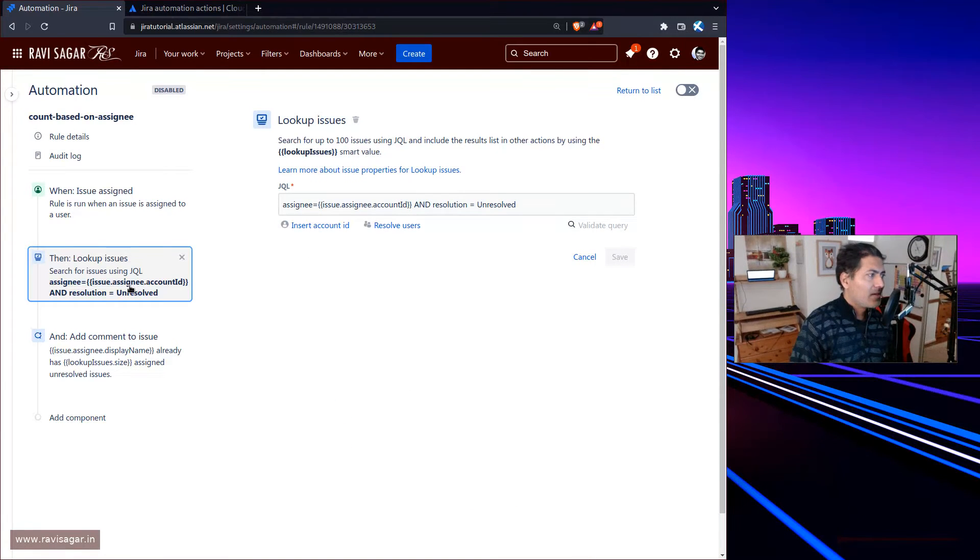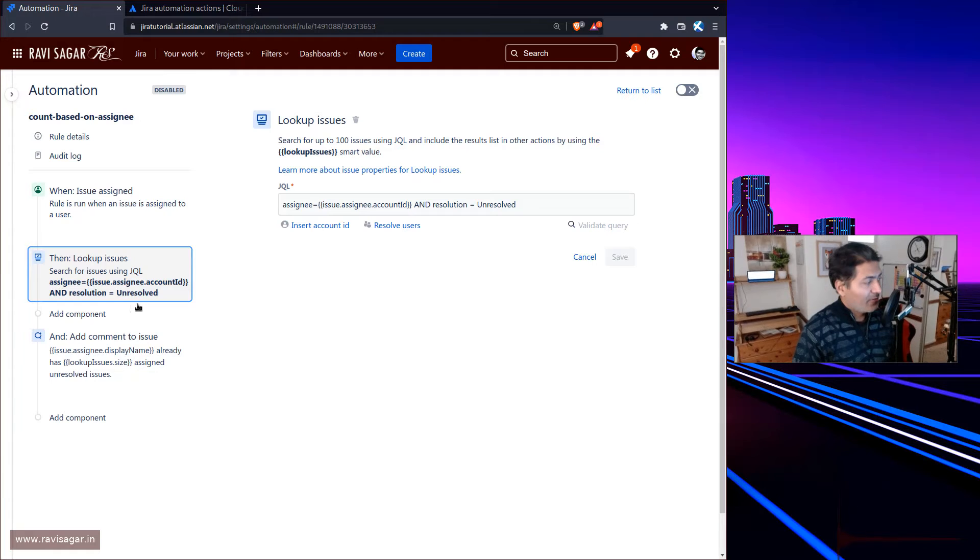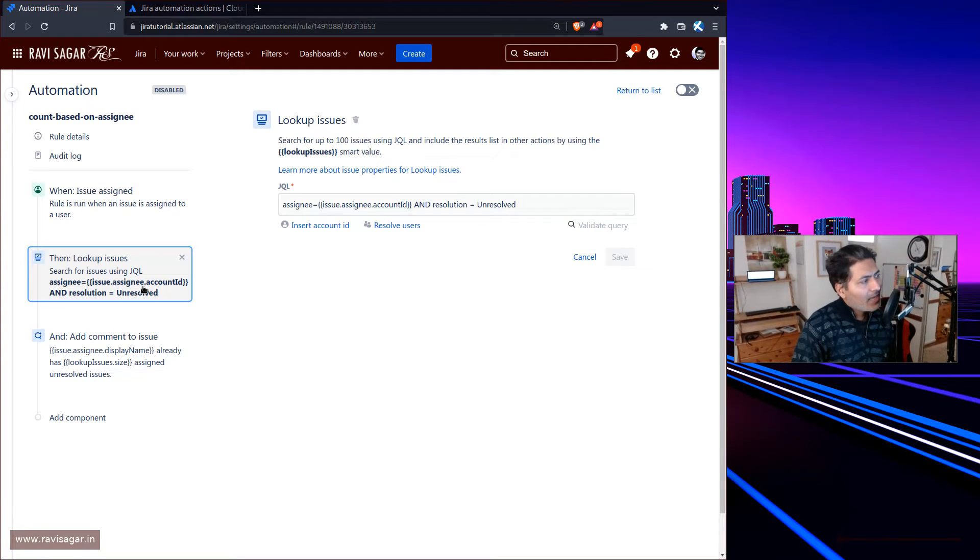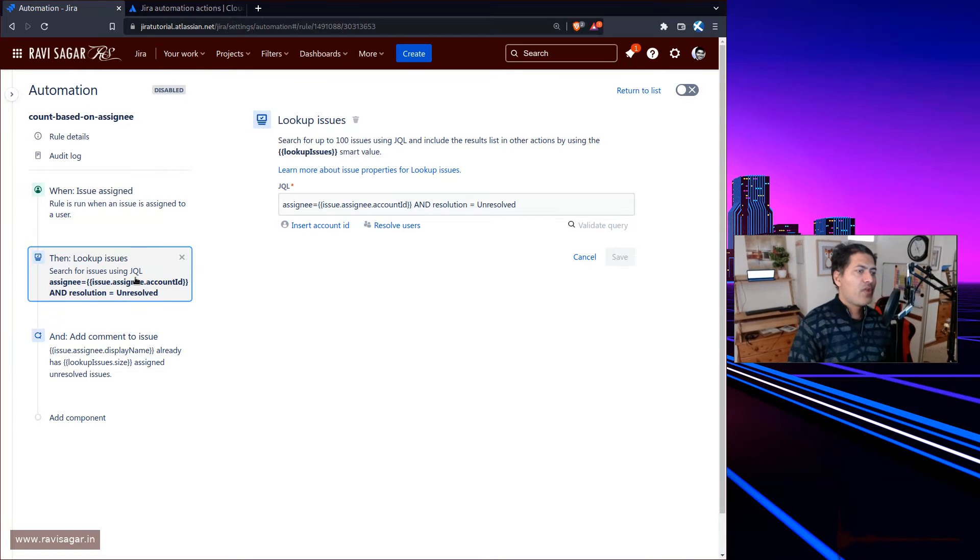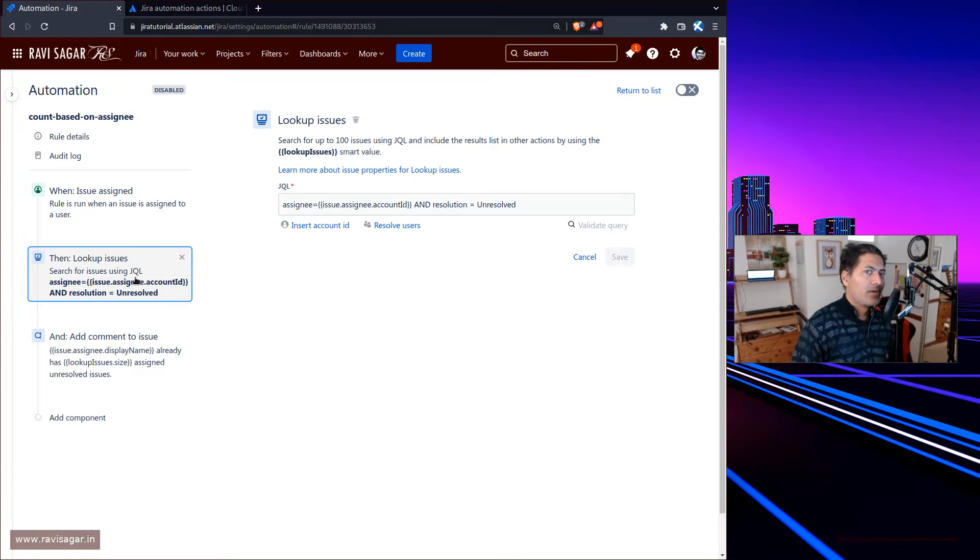What I did - I made a video where I defined a rule that will add a comment on the issue telling you that this particular assignee has 10 or 20 issues already.